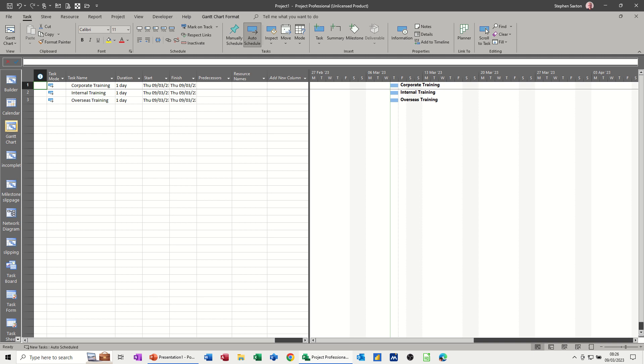For example, if a resource is going to do corporate training, they get a set amount. If it's internal training, it's a different amount. If it's overseas, it's a different amount again. So that is in the cost tables in a resource.